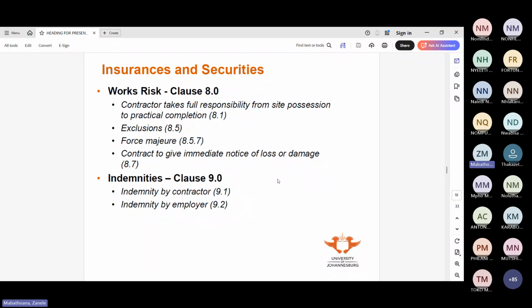Lucanio has a question. Yes, Lucanio? It wasn't a question, ma'am. It was just to assist with regards to the bulking, especially around civil works. Each layer usually would have a bulking factor. If it's a G9 or a G7, then those factors allow you to get reimbursed for taking out that extra material.